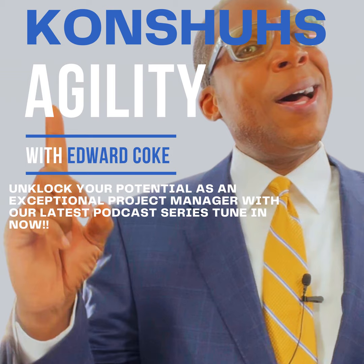Now, I do have to admit something. Controlling PMOs are important. What do you mean, Ed? Okay, let me tell you why it's important. If you are a startup, or you could be in business 20, 30 years, if you never had a PMO and you're introducing a PMO, you first want to get the standards in place. So I can see why this is more of a directive approach. And most of the time, when you see a controlling PMO, they're normally in a very high risk environment where you can't miss the timeline, and everything has to work because the PMO will be held accountable as well as the project manager.